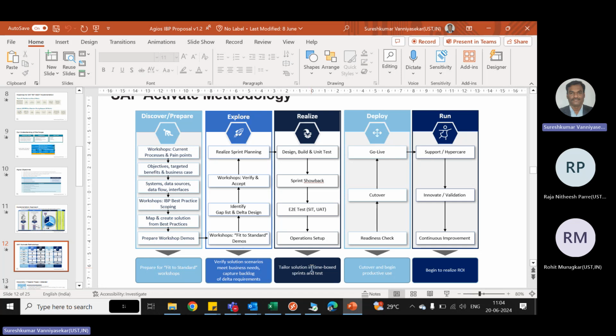closely work with them. And this CIDS thing, within the organization or with other organizations? Within the organization. Actually, if it is an IBP implementation, minimum there should be 2 CIDS consultants, then 3 IBP consultants, 1 project manager, 1 delivery head, whatever the higher level. This is the basic for a small project.